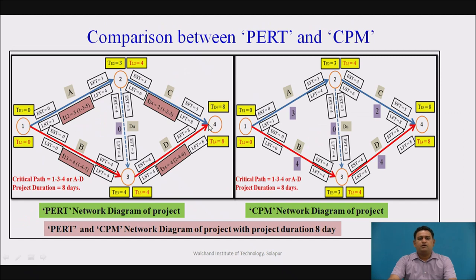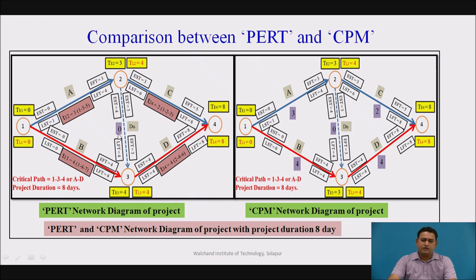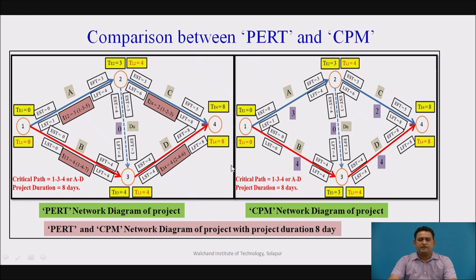This is a comparison between PERT and CPM. PERT is an event-oriented network diagram whereas CPM is an activity-oriented network diagram. Slack is present in PERT and float is present in CPM. PERT is a probabilistic type of technique and CPM is a deterministic type. In PERT, the critical path is defined with the help of events, while in CPM it is defined with the help of activities.